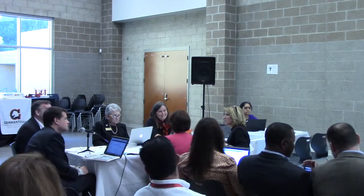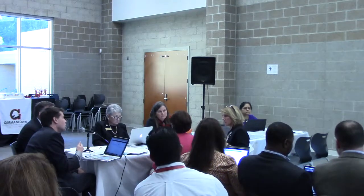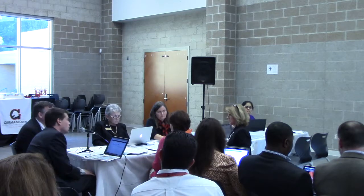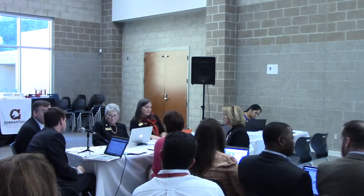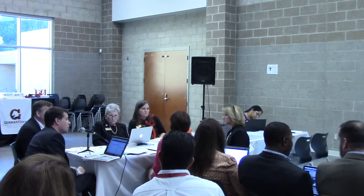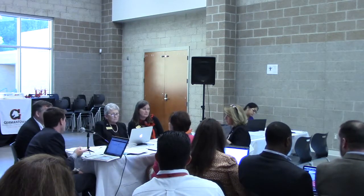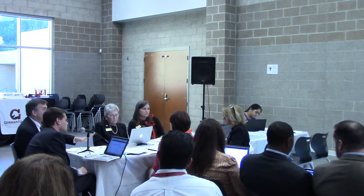But for this contract, we could walk away after the first phase. Absolutely, if we needed to. To your point, you can stop at each phase. That's right, and say we're done. It will be a requirement in the contract to stop at each phase until they have received approval to proceed to the next phase, and that will all be dependent upon the board being comfortable with where we are in that process. I think that's a good control. To your point, you don't know what you don't know, so you've got to go through the first phase to understand.